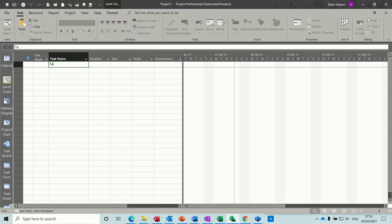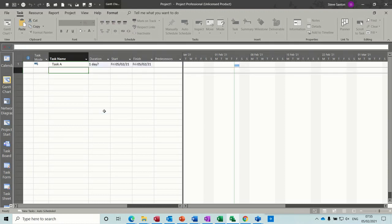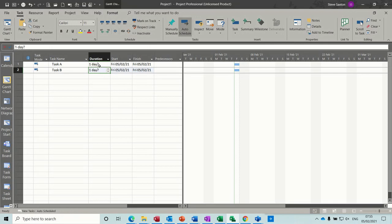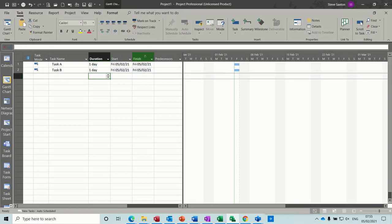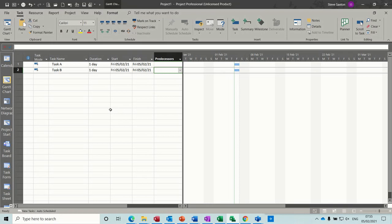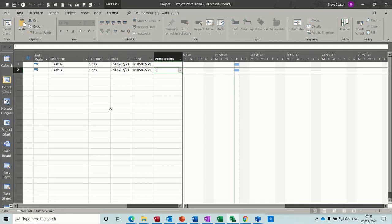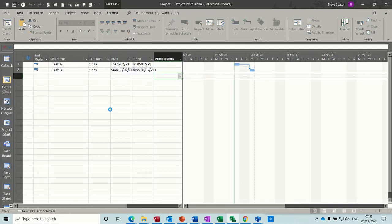So first of all, let's create a couple of tasks, task A and task B, both one-day tasks. Now normally when you link a task, you just put the predecessor number in there, so if I want this to link to task 1, I'll just put a 1 in there, and there it links.